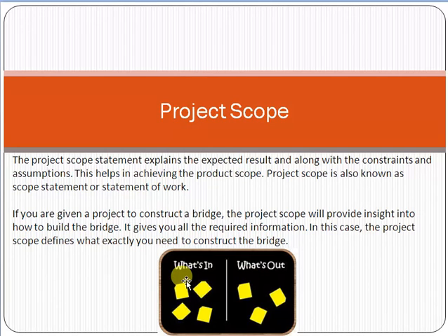For example, if there are 10 requirements agreed in the signed scope document, normally we also put an out-of-scope portion in the scope document. That means that this is not our requirement, this is not our responsibility, this will not be a part of the scope. So try to understand, scope also tells you what is not required, what is not our responsibility, what is not part of the scope, what is outside the boundary of the scope. It also tells you that thing as well.